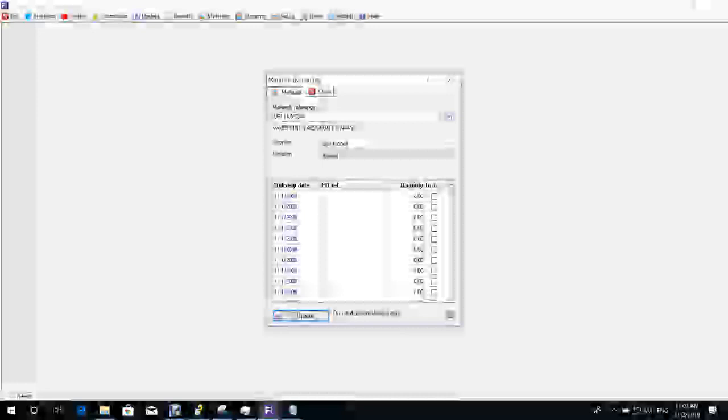We have, I think, a sister company that makes accessories. This can be handled through the critical path. Now we can have an activity in the critical path with a certain lead time. How long in advance do you need to order your accessories before receiving your PO? Accessory, we must always order when we receive the official PO. But when you receive the official PO, how long then until you start?